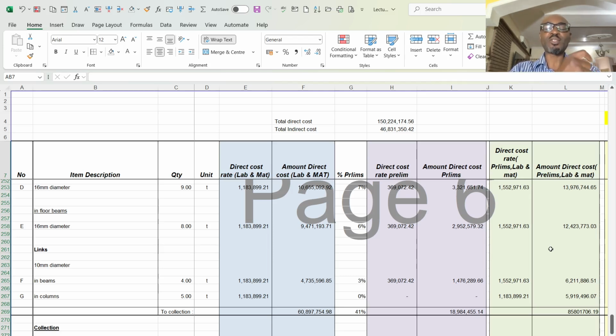He would rather prefer in such situation to go into, say, a measurements contract where a rate is provided and whatever volume of job that you carried out on site, the rates in the bill will be used to pay for whatever quantity of job that is executed. Or you go for a cost plus type of arrangement where the total amount you have expended in carrying out that job will be ascertained, then a percentage to cover up for your profit and overhead will be agreed and paid for.